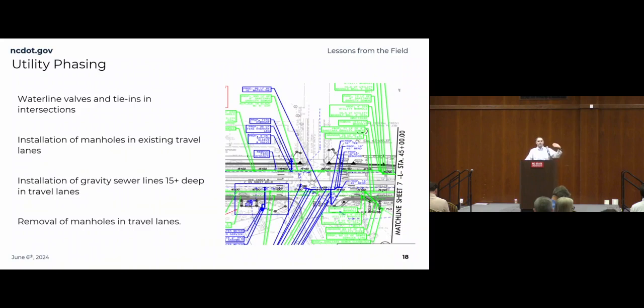We can lay it in sticks or joints, backfill it, open it back up, and keep going. When you're running parallel, that's a whole other challenge to install it and open it back up, because you're going to have to almost redig the same hole and keep running with it, with different expectations and depths to accomplish all that. So what phasing do we need to do?